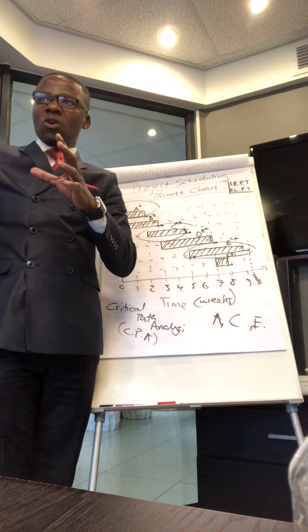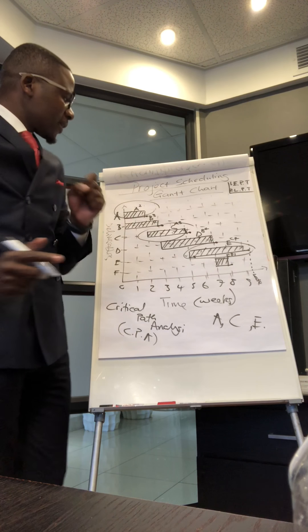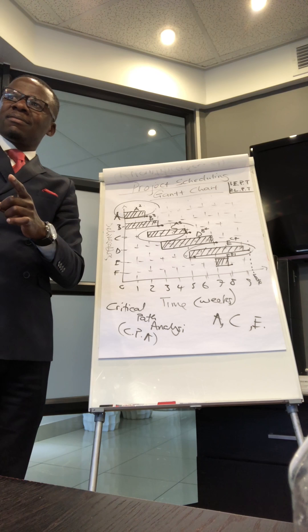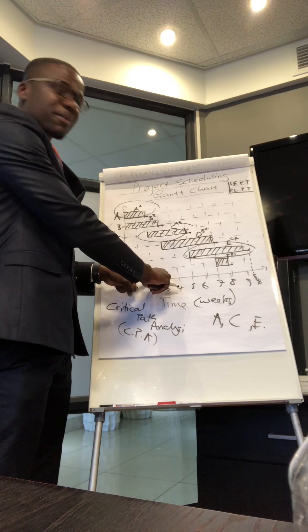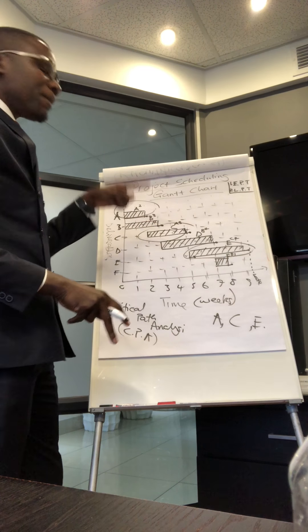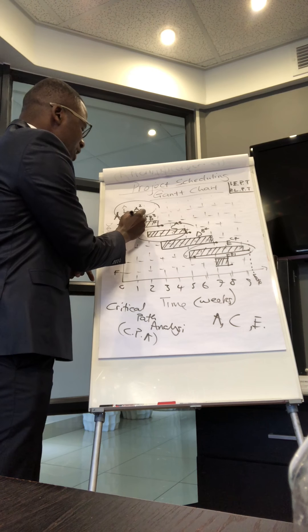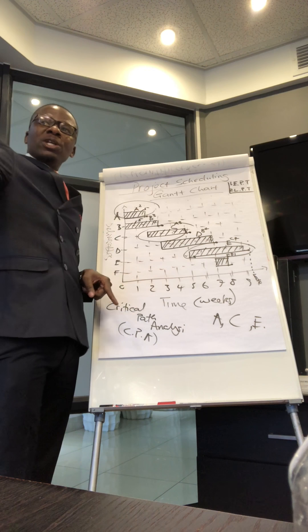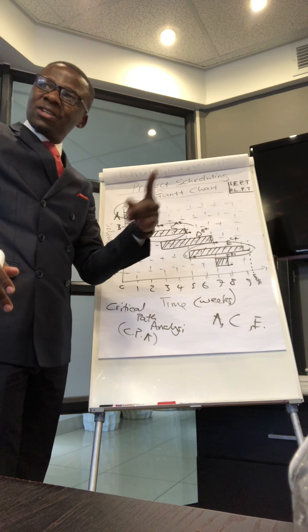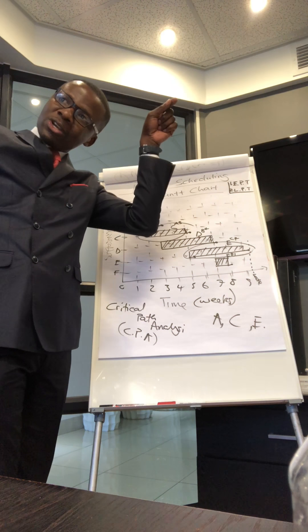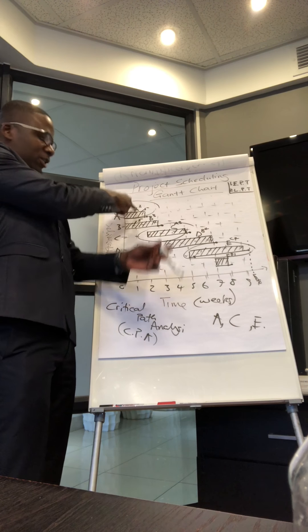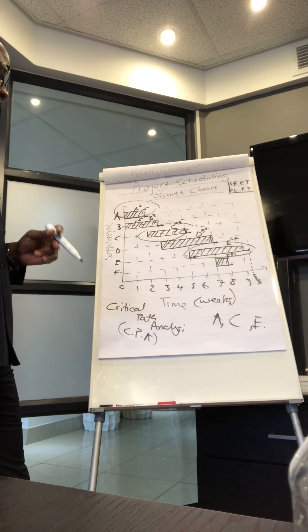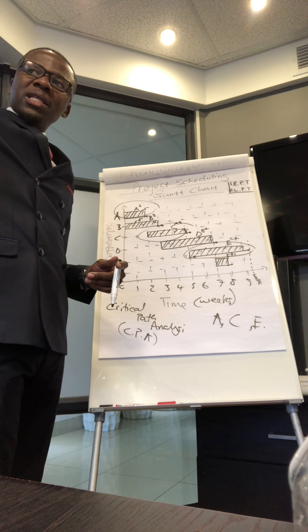One of the uses of the Gantt chart is to organize — meaning to allocate resources. For example, A and B happen at the same time in the first two weeks, and B and C overlap in another week. But A is critical and B is not. So if you have five people on A and five on B and you're lagging behind on A, you move people from B to A so that the critical activity finishes on time. That would be the smart resource allocation decision.